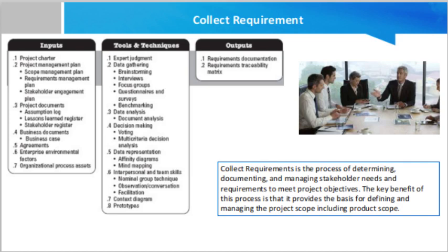Normally a few mistakes happen, such as not considering some of the stakeholders, so you miss requirements. You capture the requirements subjectively, so they are not measurable. Assumptions are not validated and requirements are based on assumptions. These are very common mistakes. Then, trying to jump to a conclusion before you understand the problem or need of a stakeholder, and missing the priority of the requirements. There is a principle called MoSCoW. MoSCoW means must have, should have, could have, and won't have. The additional O was added to make the word pronounceable.